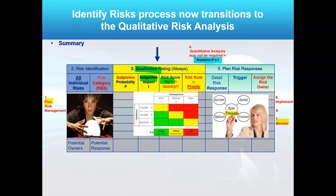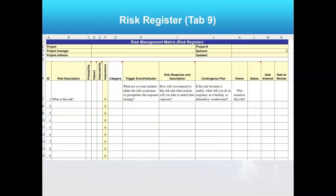Hi team and welcome back. We had just been talking about the risk register — that's tab nine again in your project management toolkit for supervisors. Notice again, you're doing this with the team, asking key stakeholders what risks they see, and writing them all down. The risk register will have all risks, and you'll note the probability and impact, which will be subjective at first — really it's to help you prioritize.